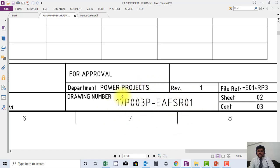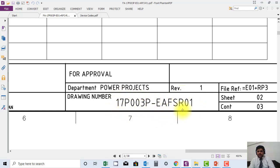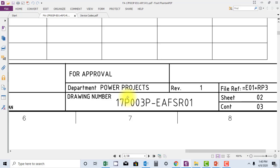Make sure it is the correct version. If you are in the commissioning stage and you use an older version, you will spoil everything — you will do all the modifications as per the older version, and when commissioning starts you will have to do everything again. So you have to be very careful about this. Thank you very much.